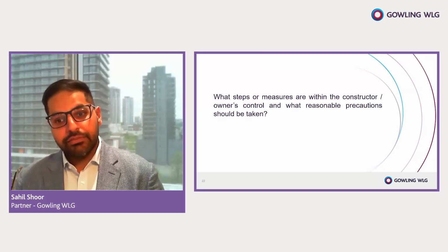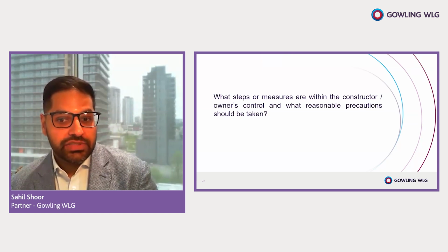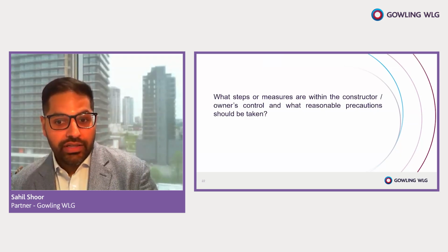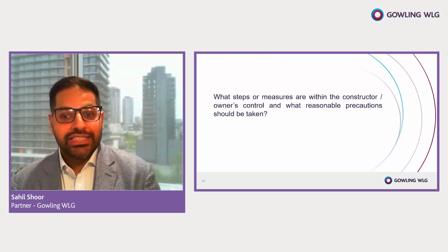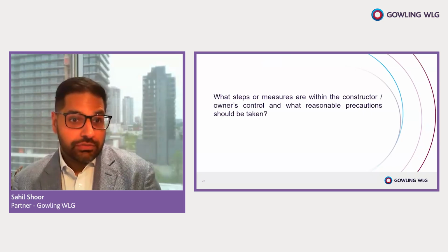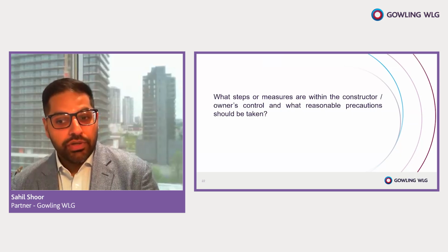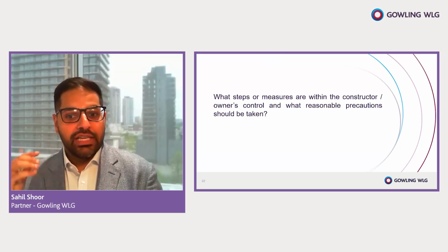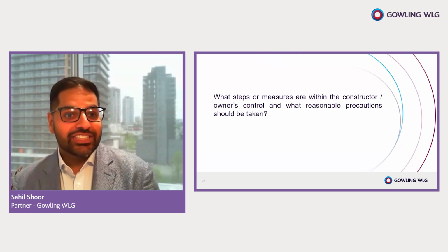So the next step is, what's your system? And not only what is your system and how is it set up for you to report internally to track these issues, because once you know about it, what are you doing about that? Usually a standard of any kind of monthly progress report is a health and safety report, which includes incidents on site. Well, hopefully you've got that, but if an incident has been reported, what are you doing about that next month? Are you following up, or is it just, okay, we had it on the list, we checked that box, and we don't have to think about it? That, I say, would be a gray area, danger category.